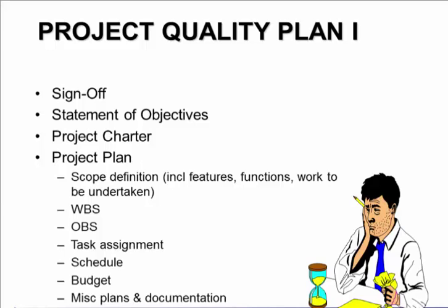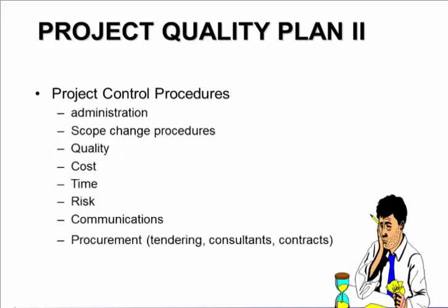Okay. So project plans can be quite extensive, but you always must have an eye to consistency, and that's where the quality then comes in. So make sure you do have a statement of objectives, a project charter, a project plan, which includes the definitions, the work breakdown structures, the organizational structures, the task management, the assignment, and the project plans become an important aspect.